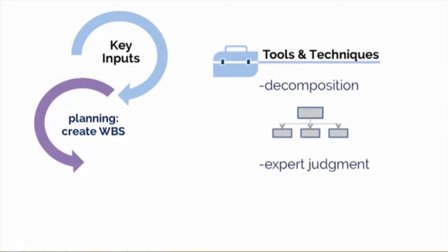Decomposition is a key word here that means breaking down. In this process, we are breaking down project deliverables with higher level components being decomposed first, and then the next level components are further decomposed until it is acceptable to stakeholders for planning, delivery, and control. We may need subject matter experts, in other words, expert judgment on the team to help us in this process.